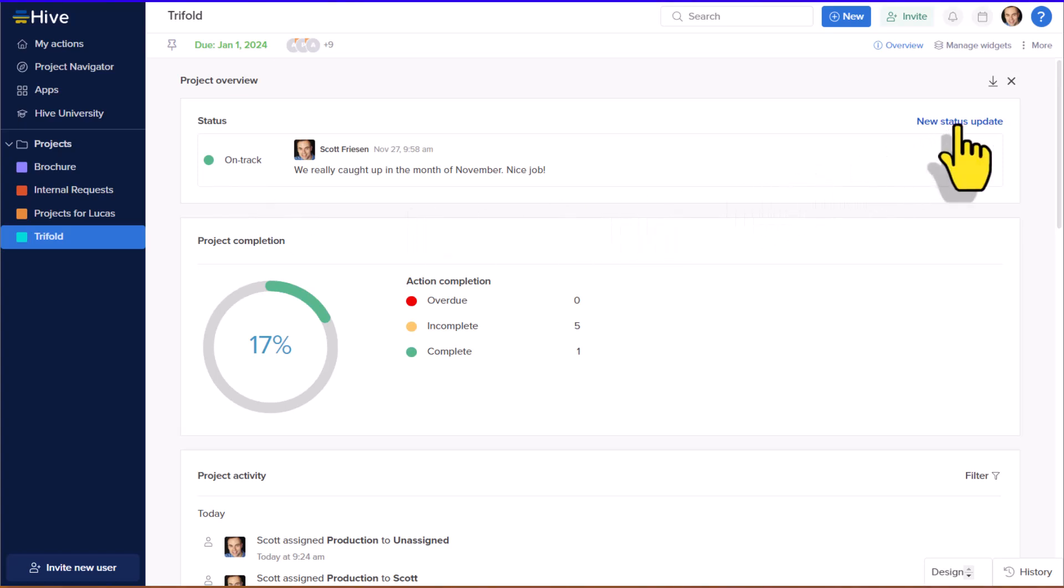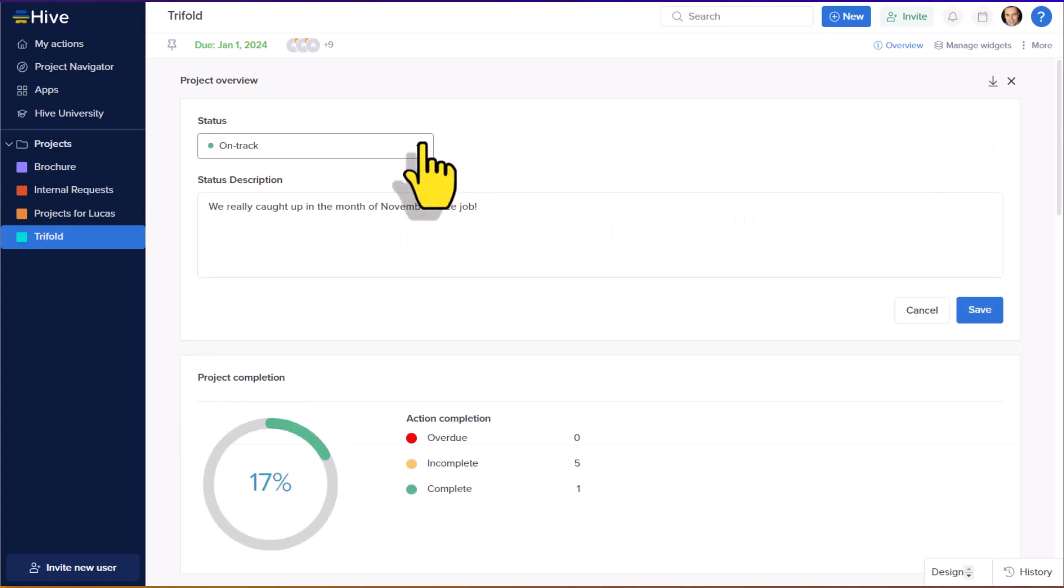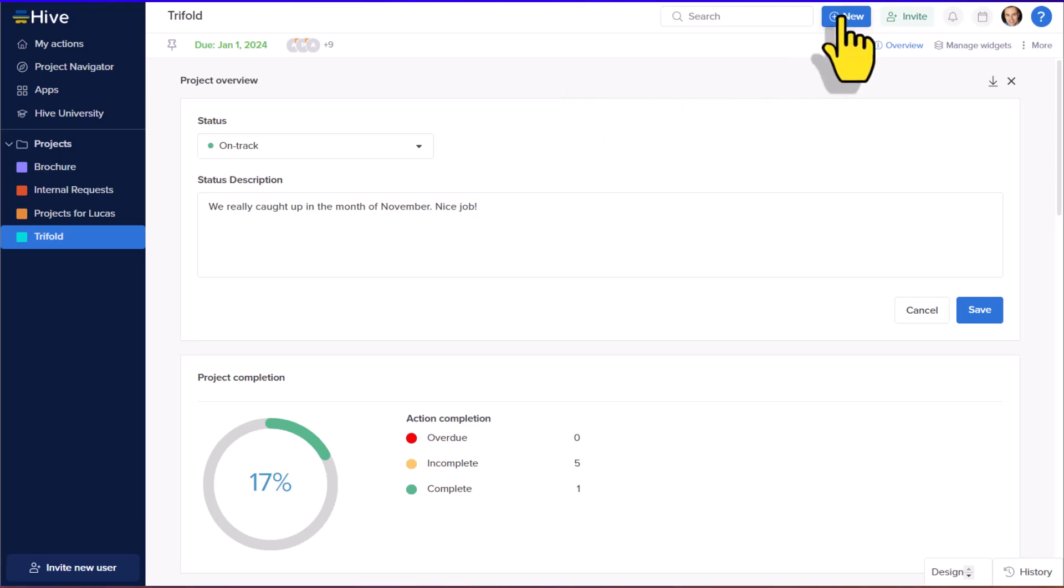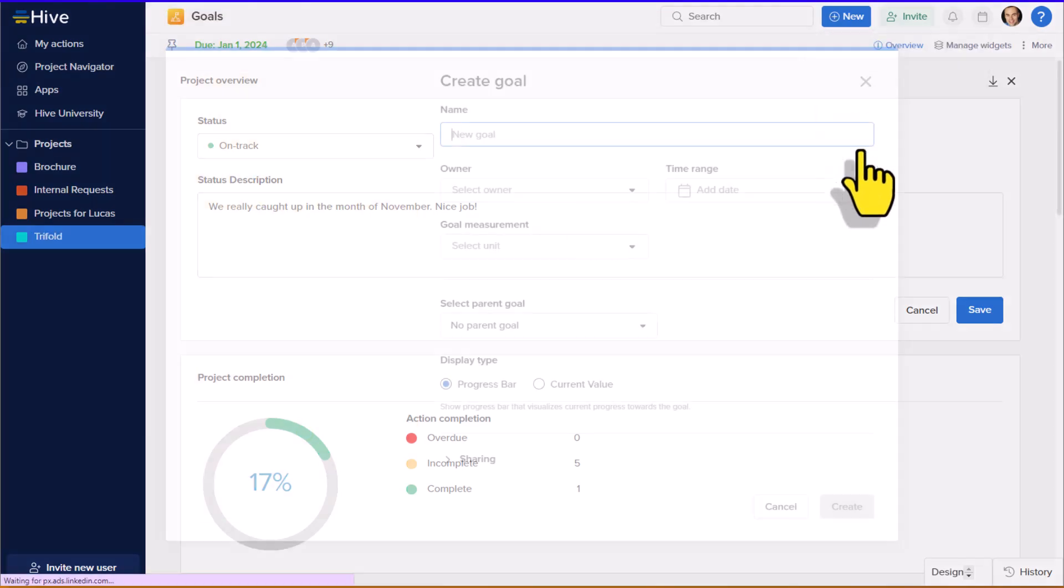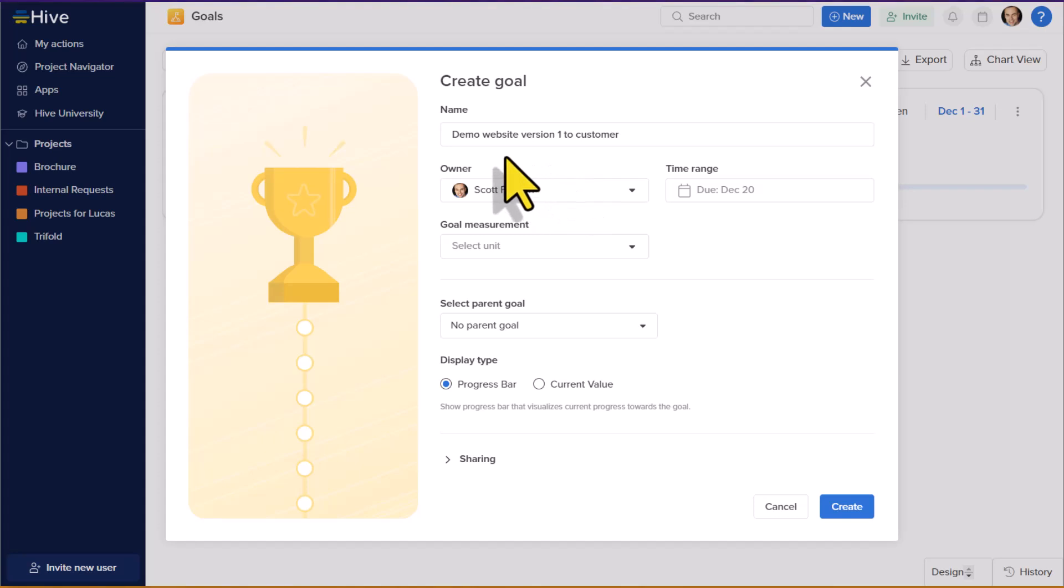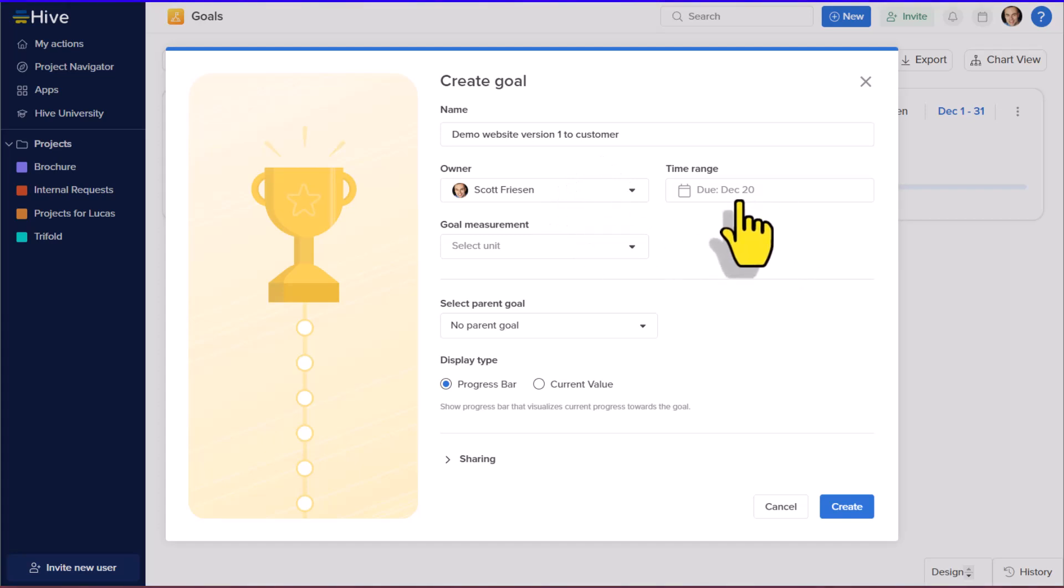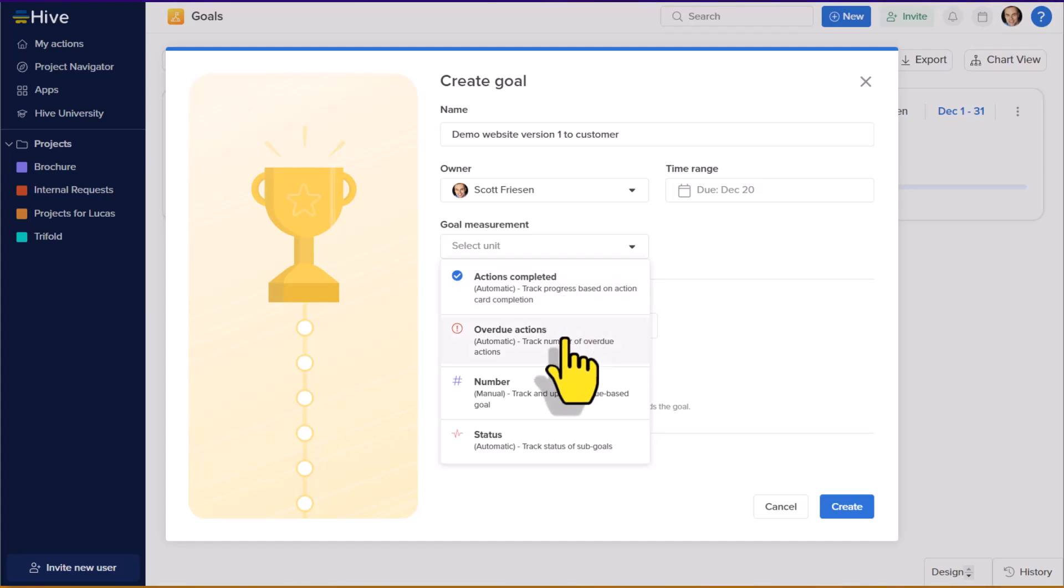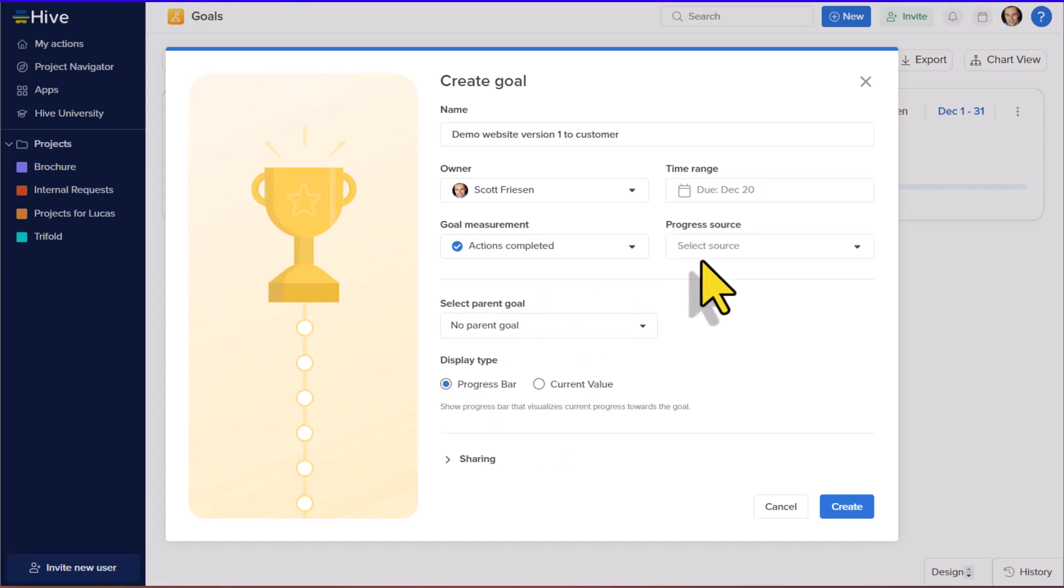But if things change, I can come up here and create a new status update. Either we can be at risk or off track, something that everyone who is working on this project can easily see and keep in mind. But on top of that, we can also create specific milestones and goals. Up in the top right-hand corner, if I select new and select goal, I can enter in a specific milestone. So in this example, perhaps a key goal that we have is to demo the new website to the customer. I'm going to be the owner, and this is the date in which we need to do this by. And although this is often where we stop with a particular date, we can take things one step further and add a goal measurement.